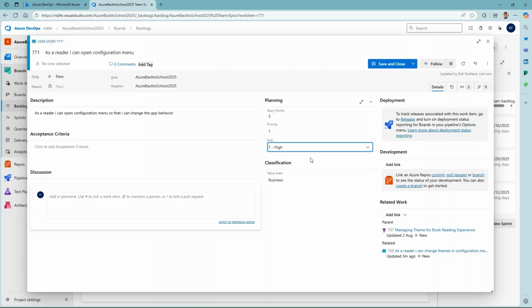But it's not only about the three attributes themselves. We also think about the related work. So if the story is related to another user story and the other user story should be developed first, you can't develop this user story alone. So the rule of thumb is do the priority first, and after that find the low risk user story.